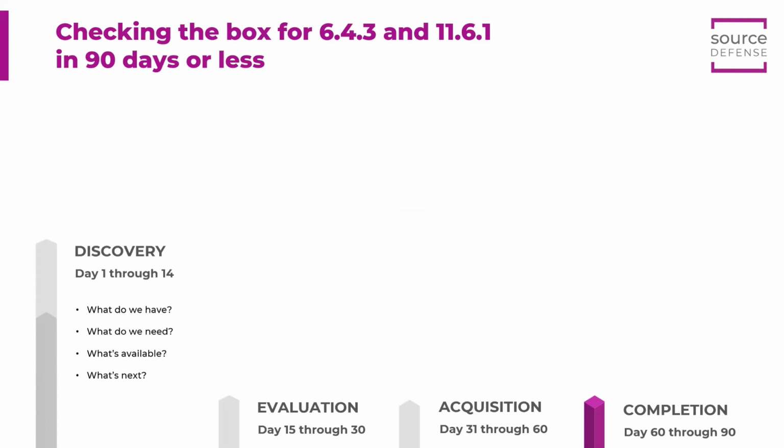And then basically, what's your plan? Obviously, it's pretty brass tacks project management stuff, but work backwards from a date. March 2025 is certainly looming large, but that doesn't mean anybody's going to be able to implement a solution the 3rd week of February to be ready for that. So work backwards from that, and also factor in, depending on your area of practice, do you have a code freeze coming up? Do you lock down the website or the equivalent for the holiday season or another particularly revenue sensitive season? Dev cycles, frankly, that kind of thing. So can you get into the sprints that the devs are using to integrate code?